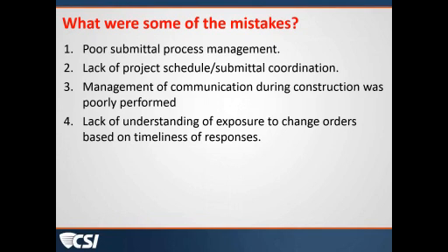There was a point that Micah raised about reviewing the submittal and having in your contract a set number of days to review the submittal. The AIA contract documents don't specify a set number of days, and I don't have the language in front of me, but it basically states that the submittal should be submitted to the architect in time enough for the architect to do a thorough review, but the architect needs to review it as promptly as possible so as not to delay the work. So there's not a specific time set.